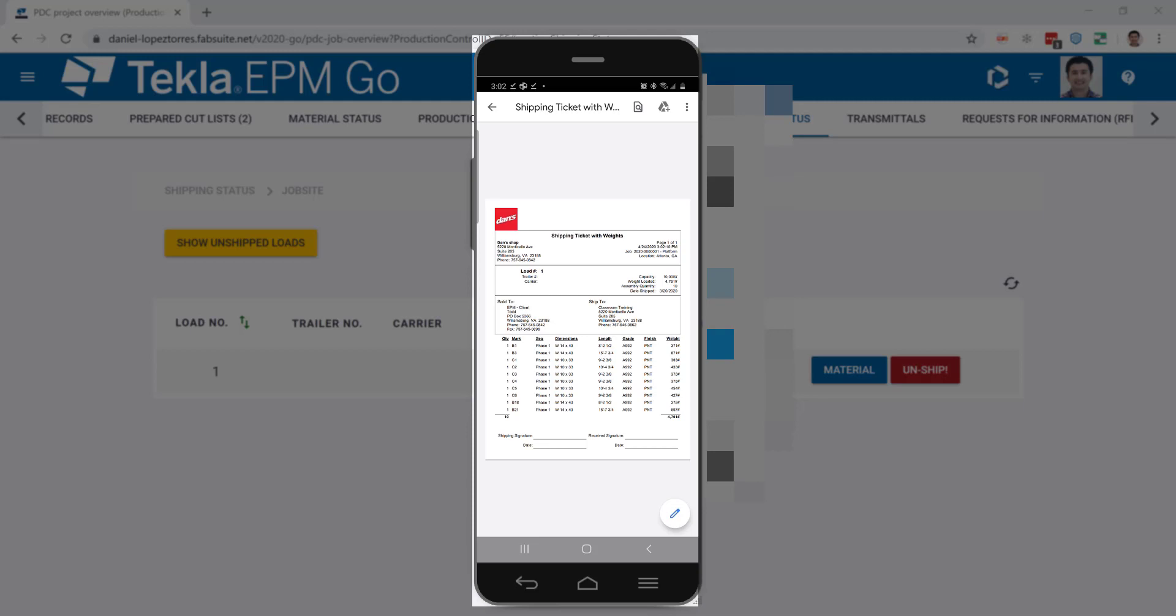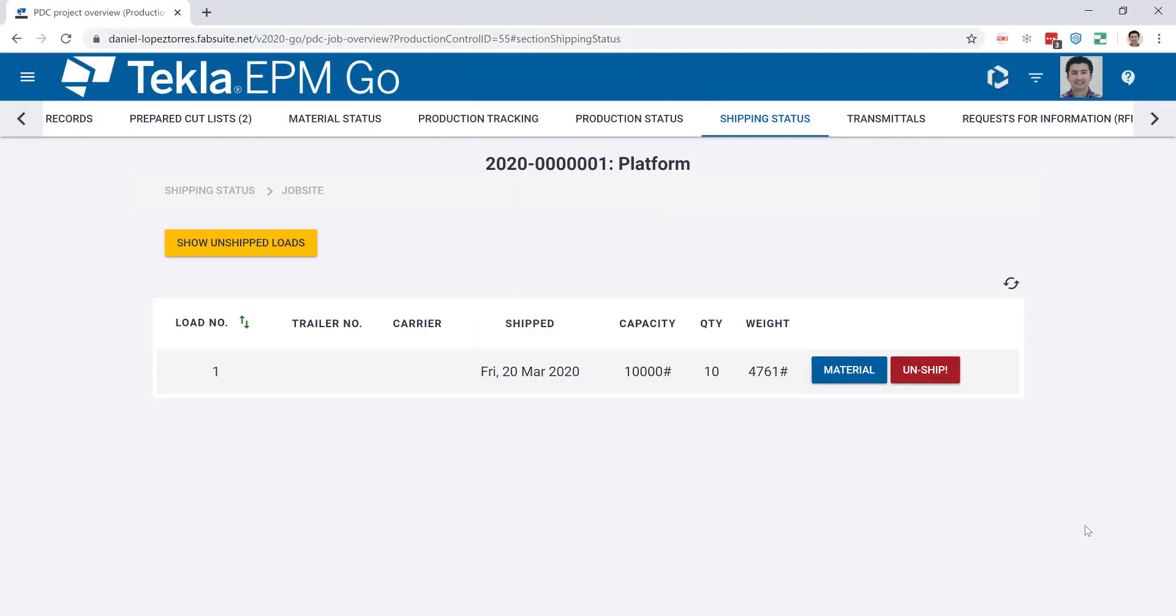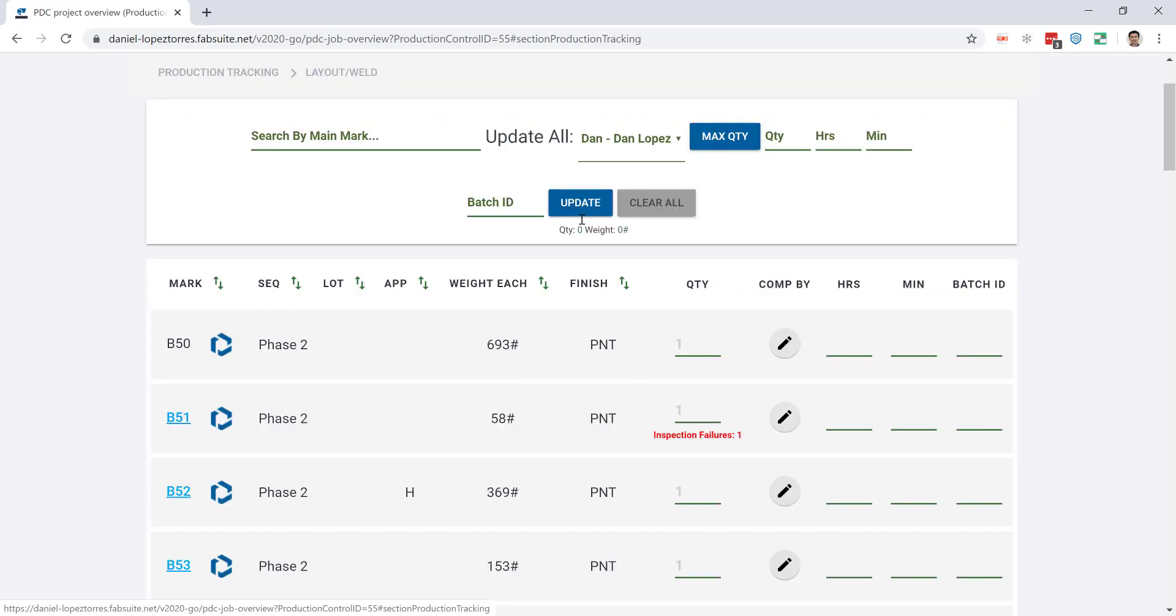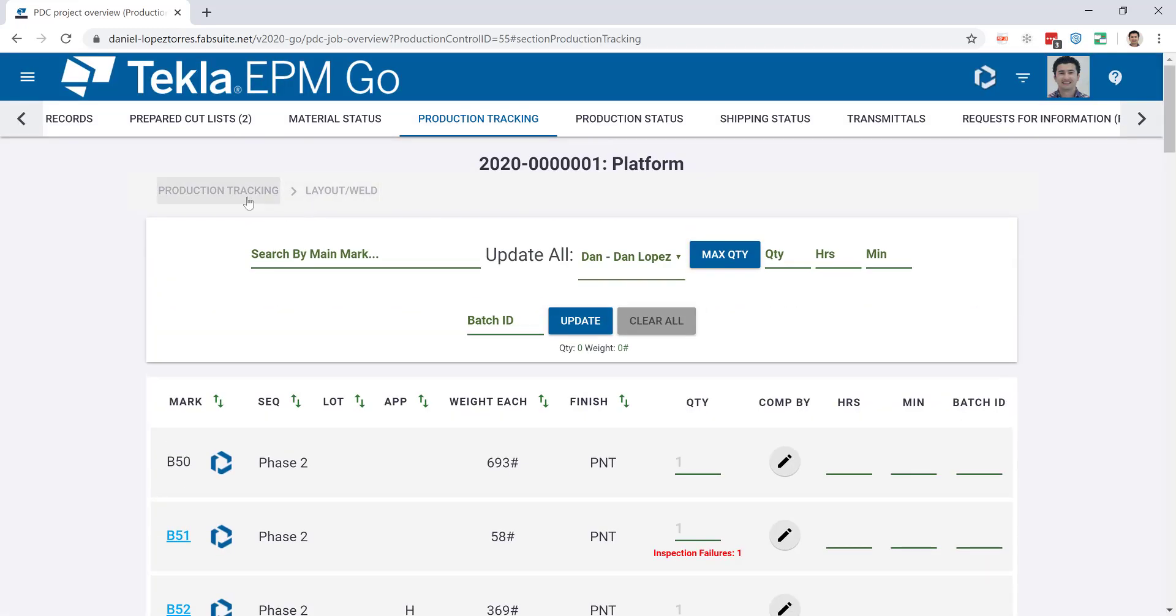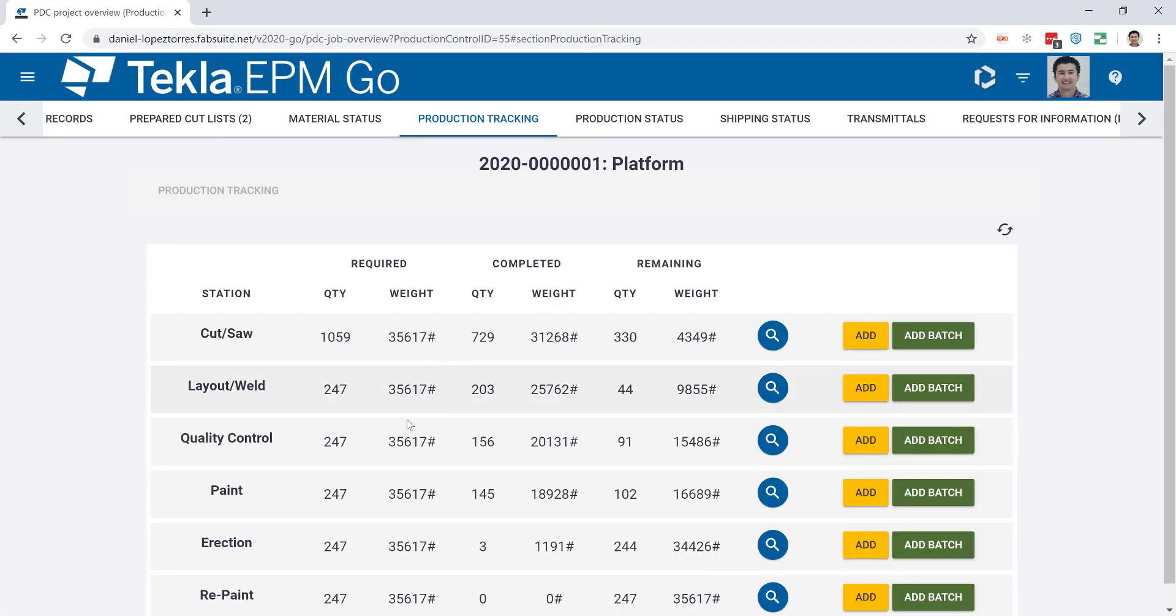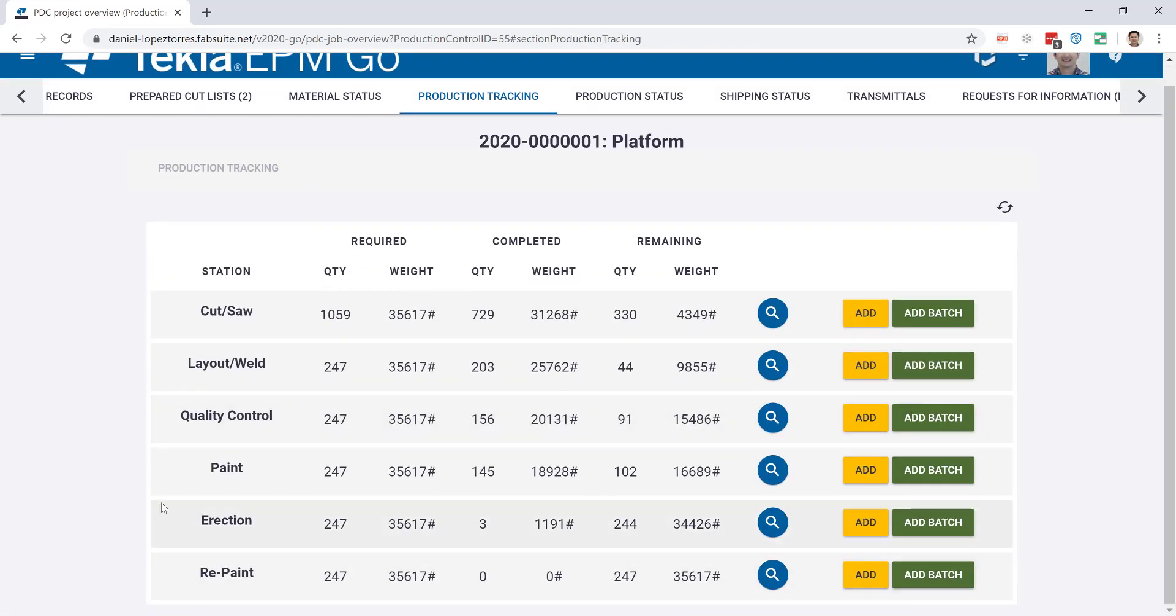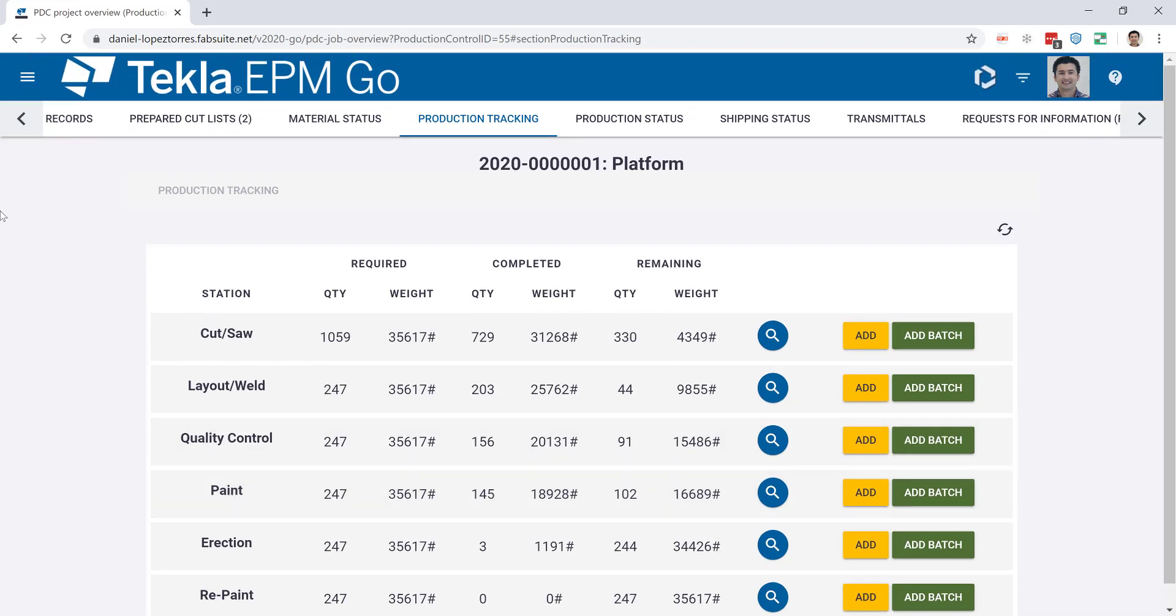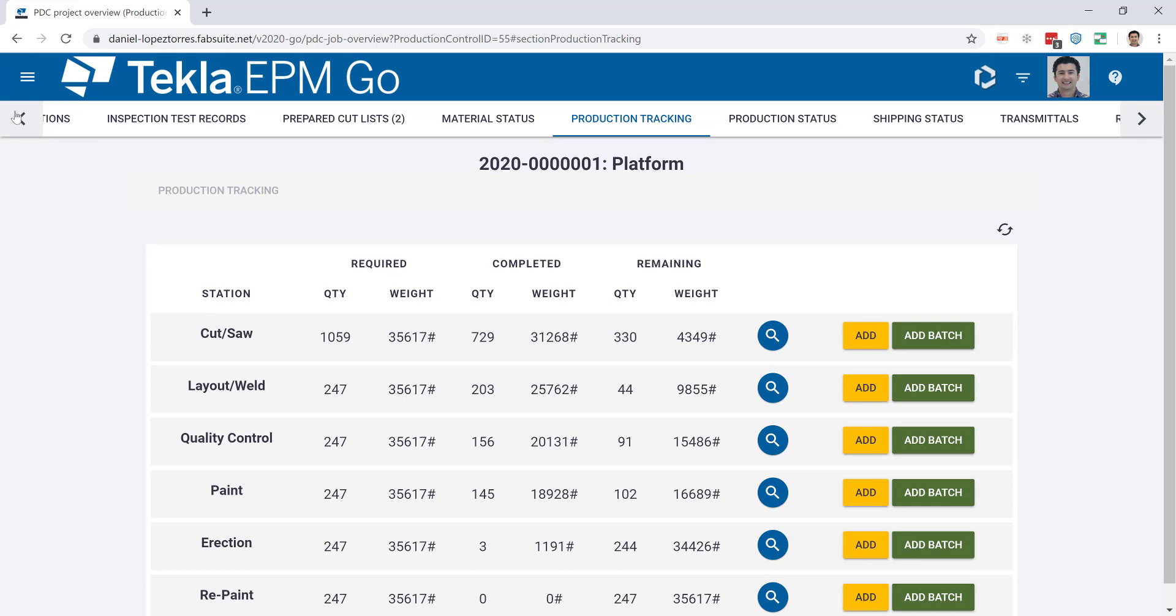And this is updated also in the production status or the model colorization where it will show up as done. A good tip also from some fabricators is to have a station on your routes for receive on job site. That can help with the track of the reception between what's been shipped and what's been received on the job site to make sure everything is accounted for.